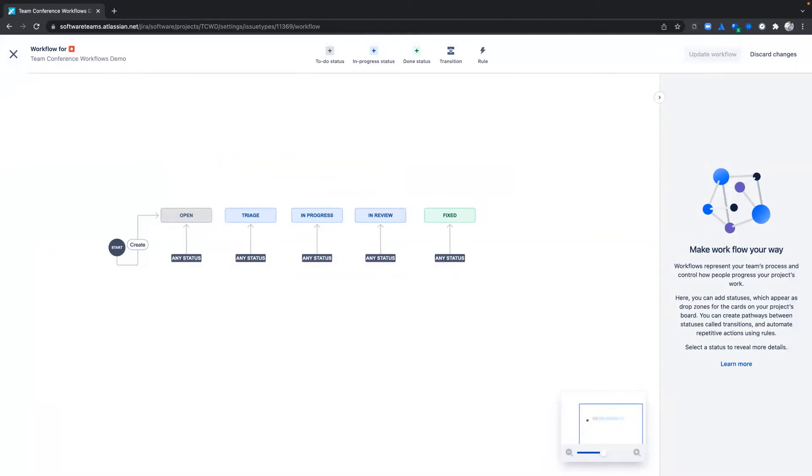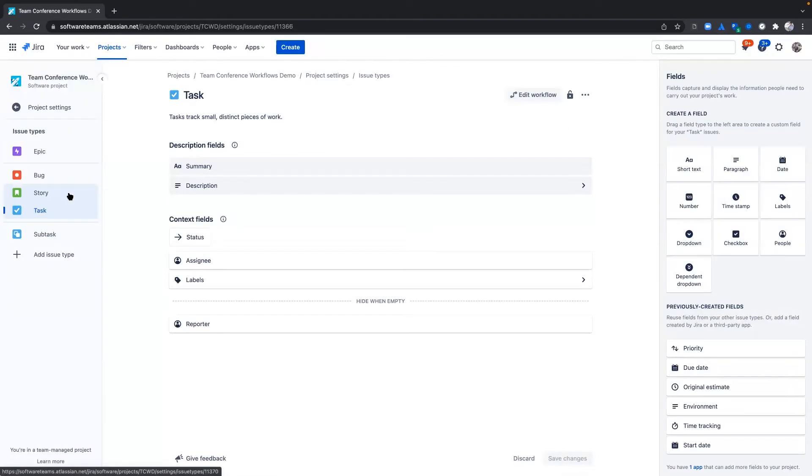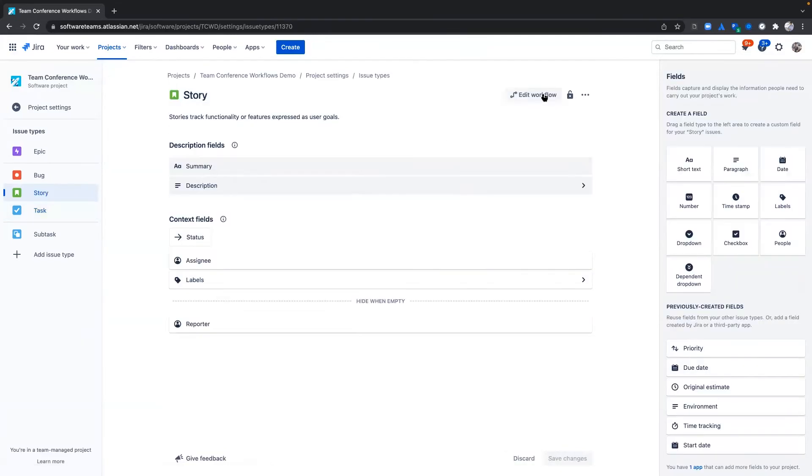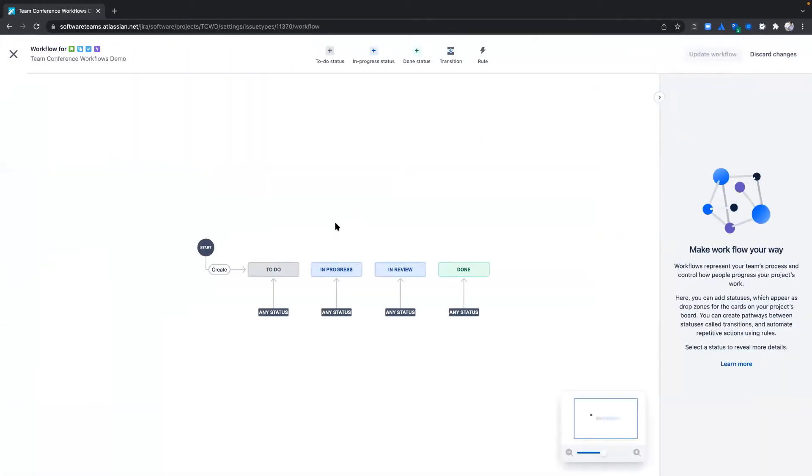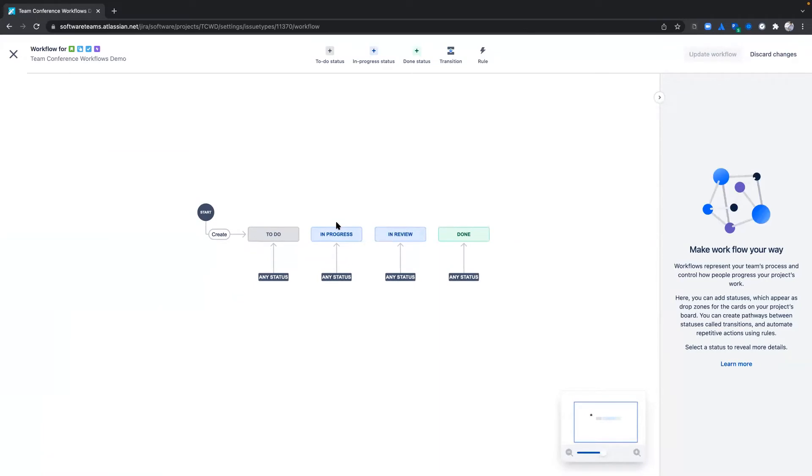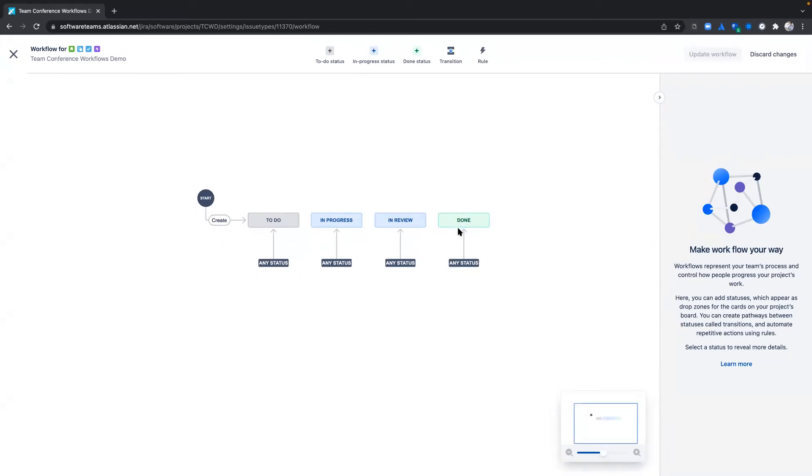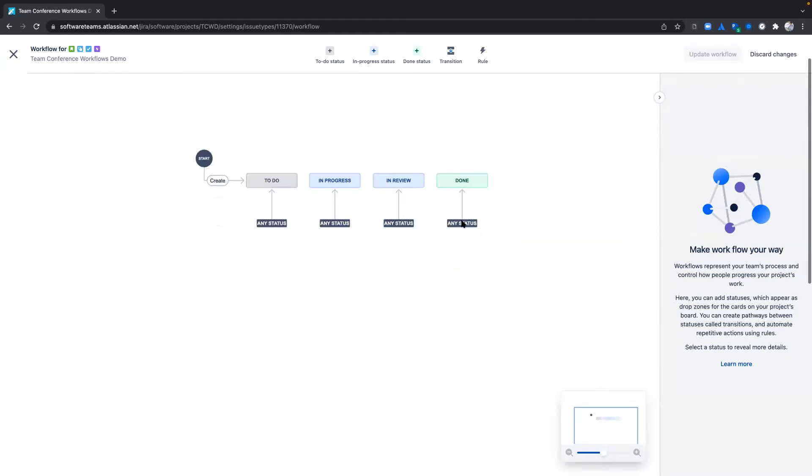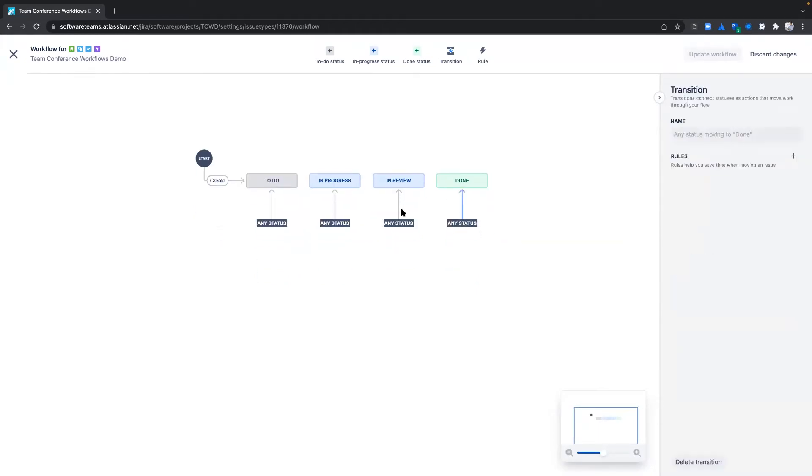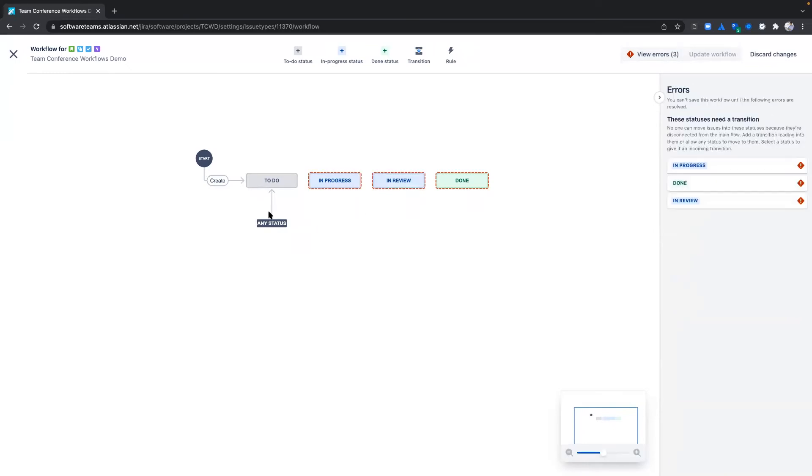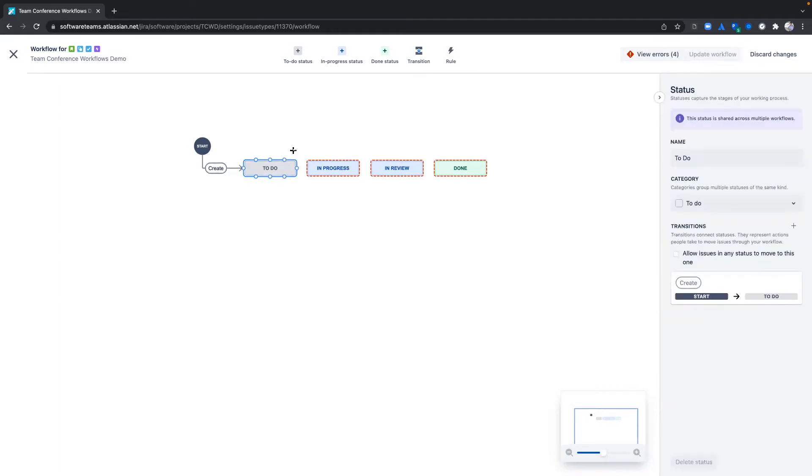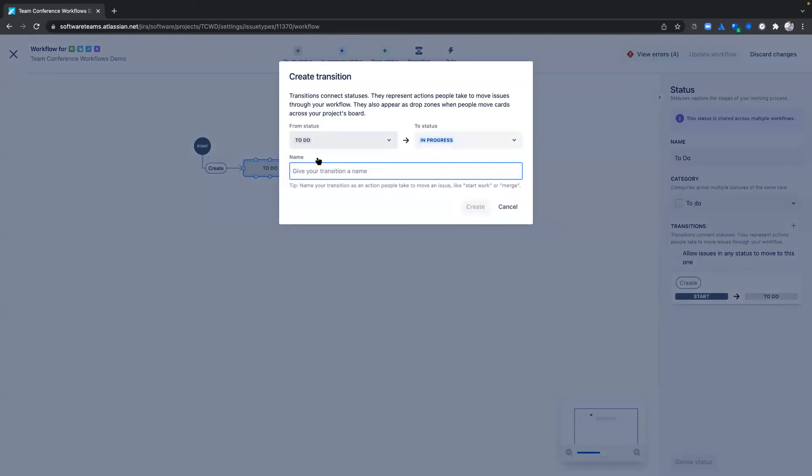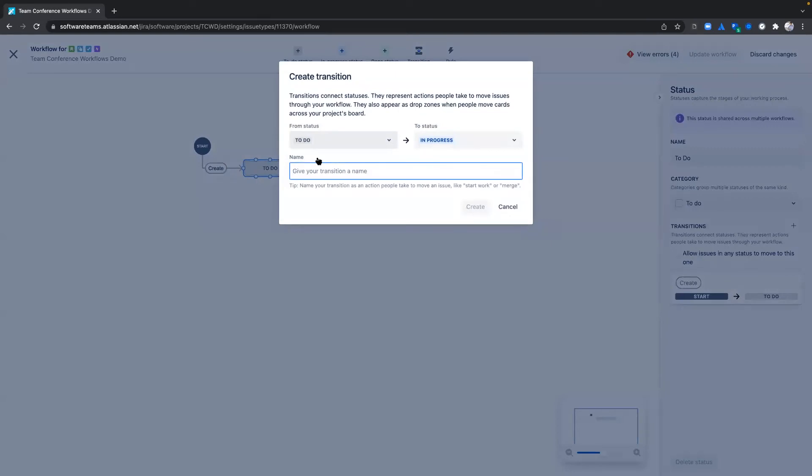Let's use the story issue type as an example. I will start by creating transitions to reflect my team's process. I want issues to strictly transition from statuses in this order, so I'm going to start by deleting the global transitions. When an issue moves from To Do to In Progress, work has started, so I'll name the transition Start Work.